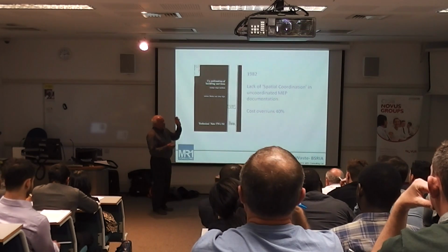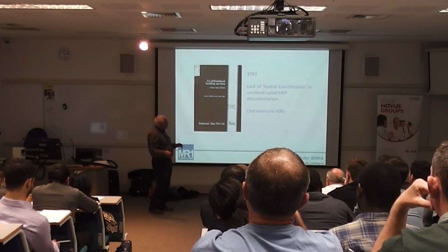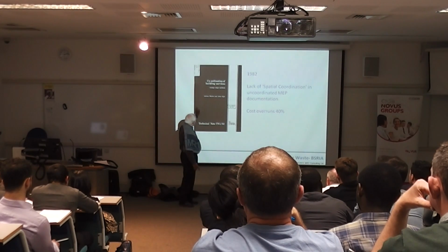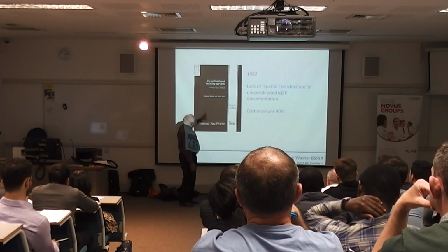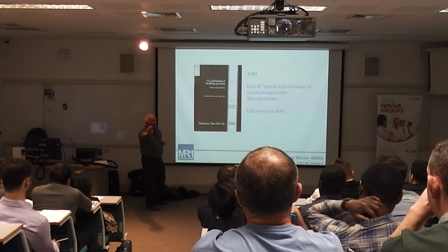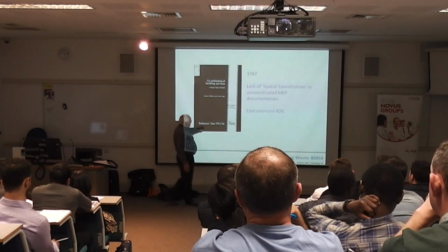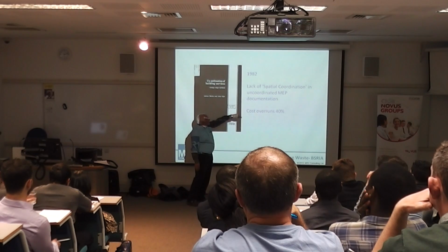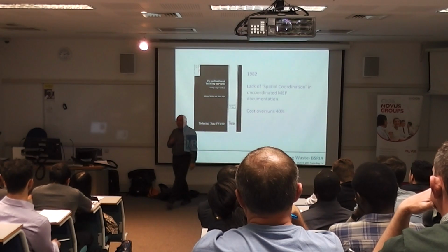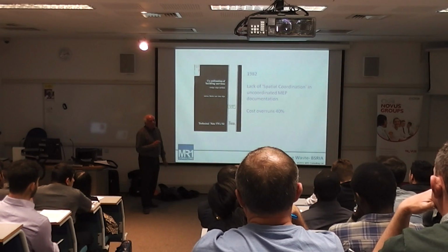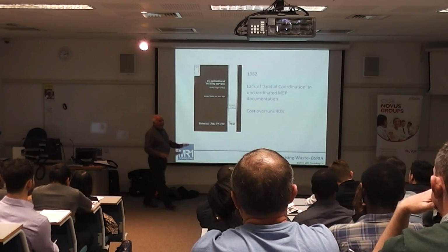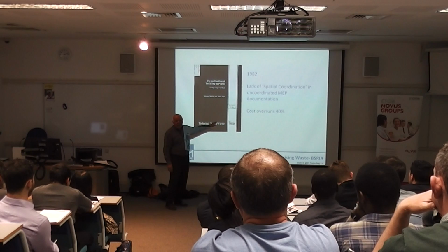If we move forward to 1982, so I've shown you the technology, other reports were written, sponsored by the government. This one is by Adrian Ritchie and John Ogle, looking at this from the MEP's point of view. We looked at structures, etc., but we've done it again through ISRIA. This time, lack of spatial coordination in uncoordinated MEP documentation creates a cost overrun of 40%.